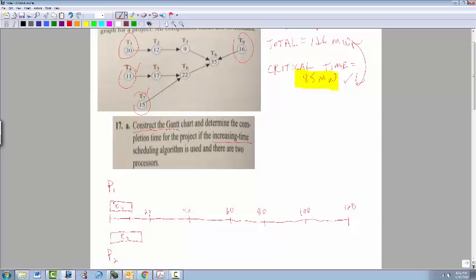So T4 will be done in the middle of T7 being completed by processor 2. So what happens, maybe you want to do this. This is done now, and that activates T5. T5 is now an available task along with T1 and T9. So that's what you have to understand. In 11 minutes, T4 is done while T7 is being done. Now T5 is an open task and ready to be done.